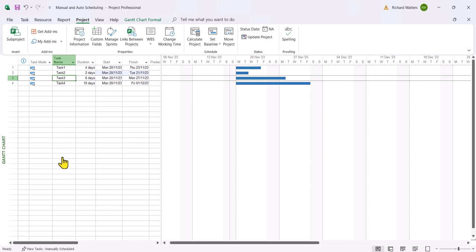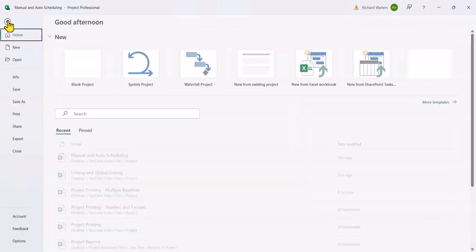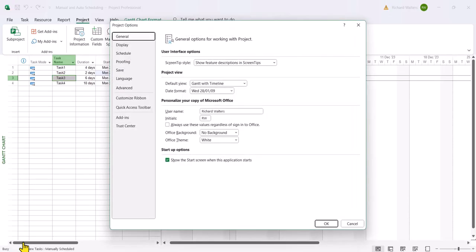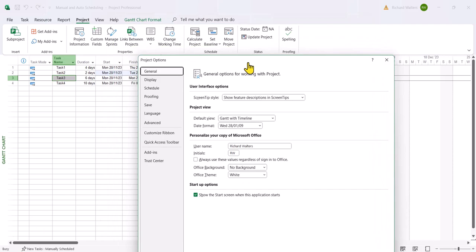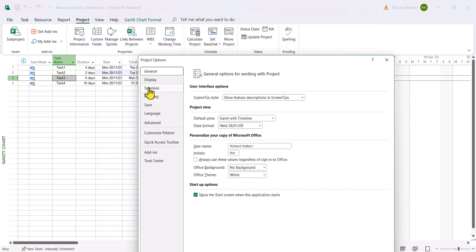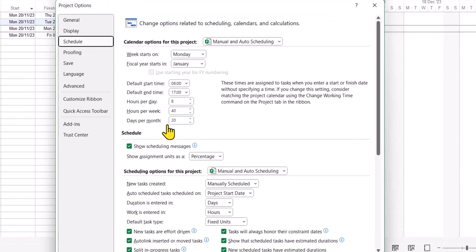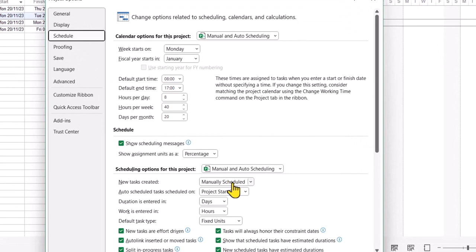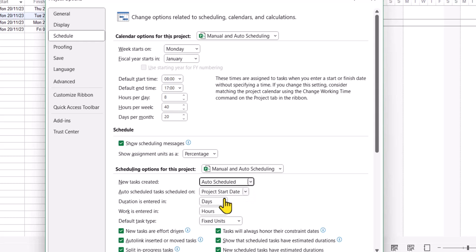If you want to update a project to auto scheduling by default we could go to the file tab, options, go to the schedule section and where we've got new tasks created is manual scheduling, you could change it to auto scheduling. Now this will change it for this project only.